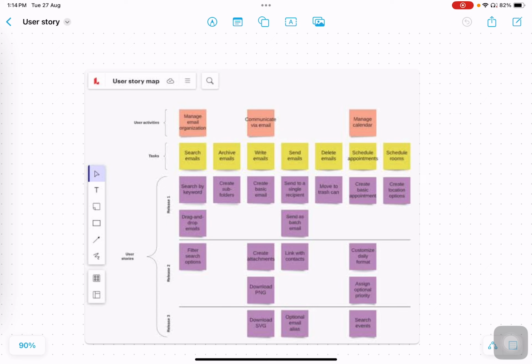Example, consider a company like Uber. When they were first developing their app, the user journey might start with finding a ride and end with rating the driver. By mapping out these steps, the team can visualize the user's experience from start to finish and identify key features needed for each step. A user story map typically has three levels: user activities, which are high-level tasks the user wants to accomplish; user tasks that make up each activity; and user stories that support each task.